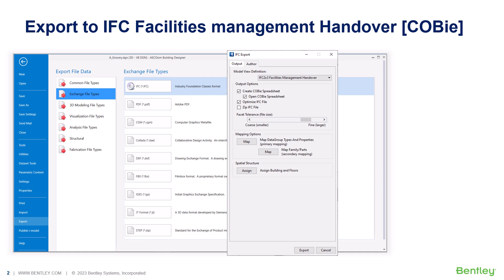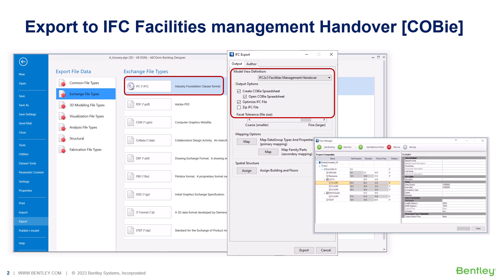To create the COBI spreadsheet, we open the IFC export dialog and select the IFC 2x3 facilities management handover model view definition. Once this option is selected, the output options for creating COBI spreadsheet can be enabled.